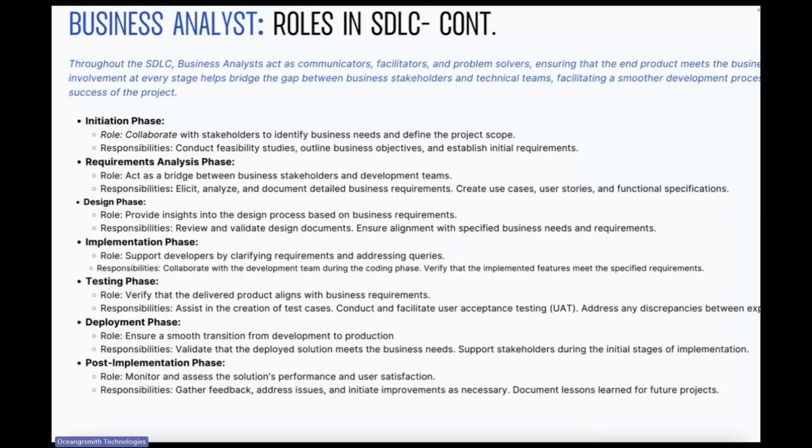The grooming session basically is just a ceremony where engineers, QAs, product managers come in, they review requirements, and engineers give their feedback. If it's something they want to do, if the requirement is complete, like design is there, requirement, user story is there, description is there, and they understand, they say, okay, yeah, we can do it. And they put a point to it and they put it in the backlog, right? And they get it ready, right?